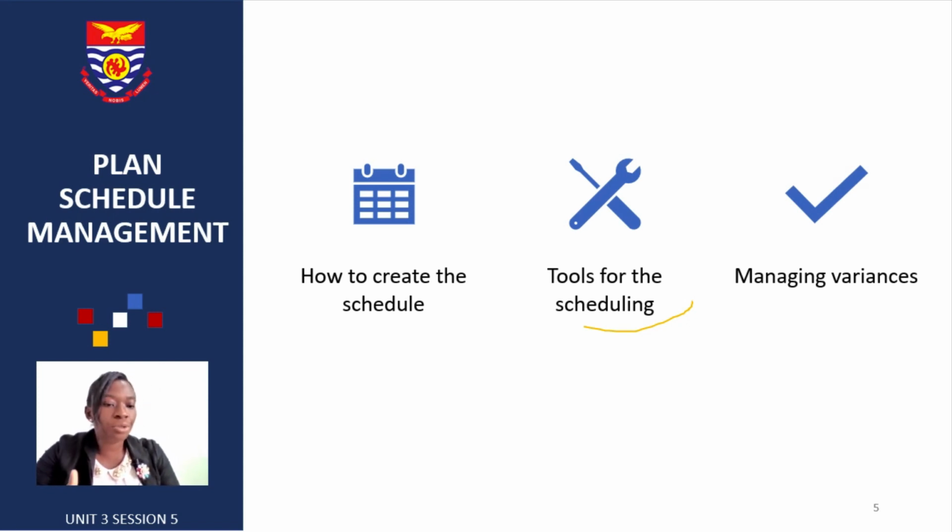You can just use it. That makes the workload way easy as well. Then obviously, like we made mention earlier, we need to manage our variances, manage the differences that come in there. And so for us to be able to do that, we need to have some sort of schedule baseline and actual baseline. You need to be monitoring them to see where the differences are coming from, what is causing it, and then how can we solve it, most importantly.